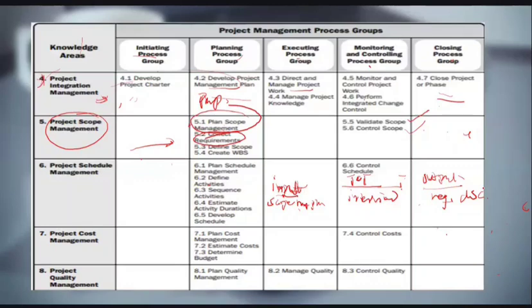Once we understand the requirements that we need, we will now go ahead and define the scope. I know what they need, so I can now determine what has to be done to achieve what they need. So I will now define the box, the scope, to know how much work we have to do. If I don't know the requirements, I wouldn't be able to define the scope.